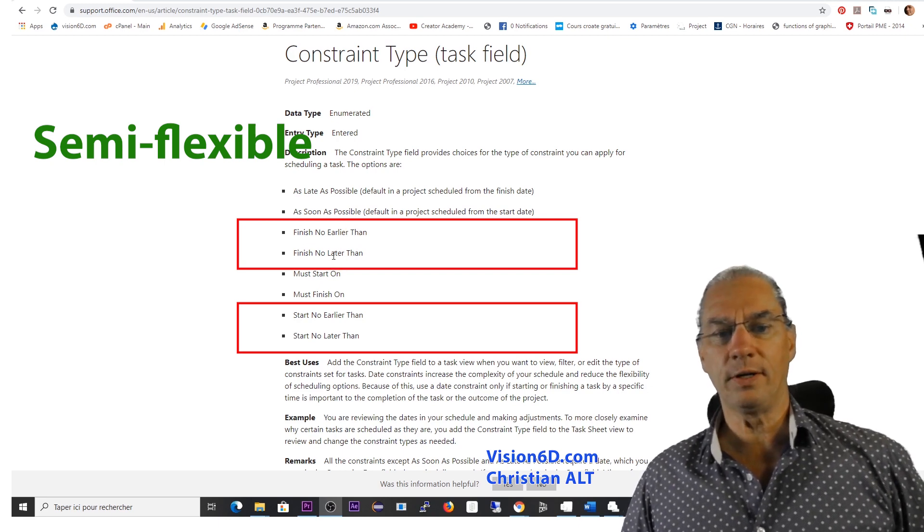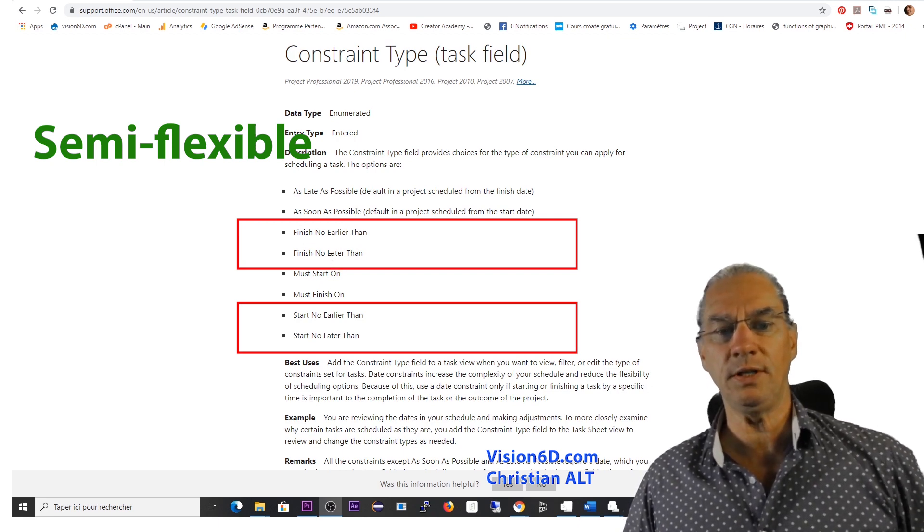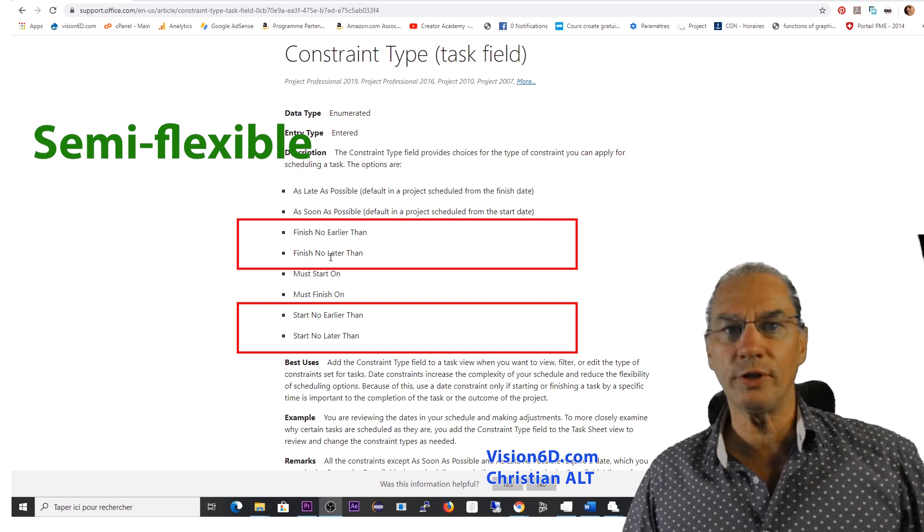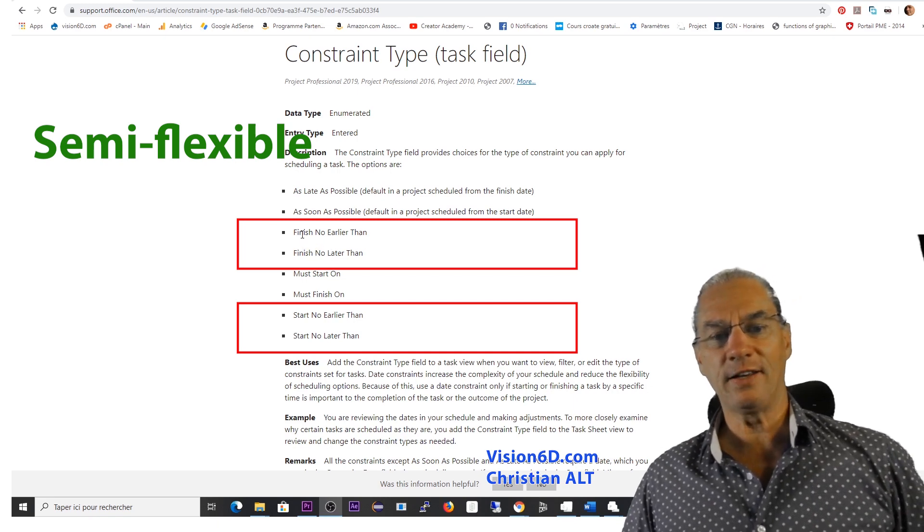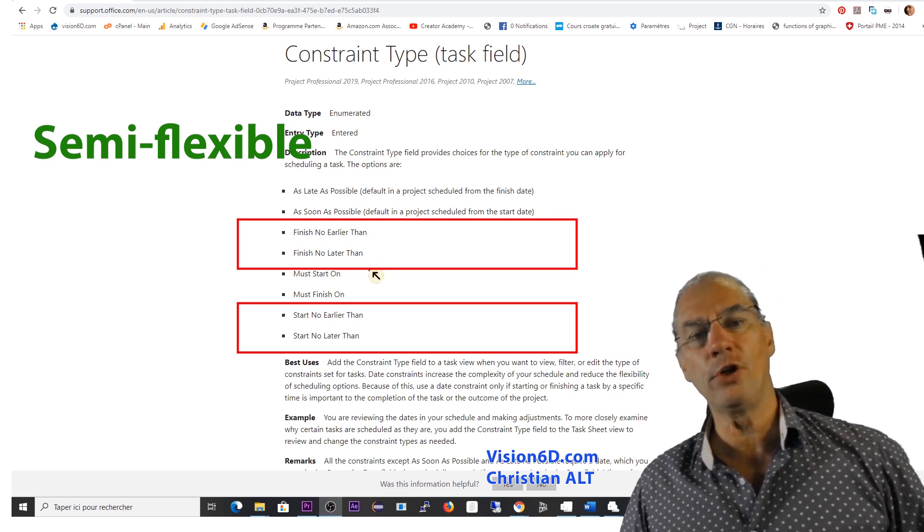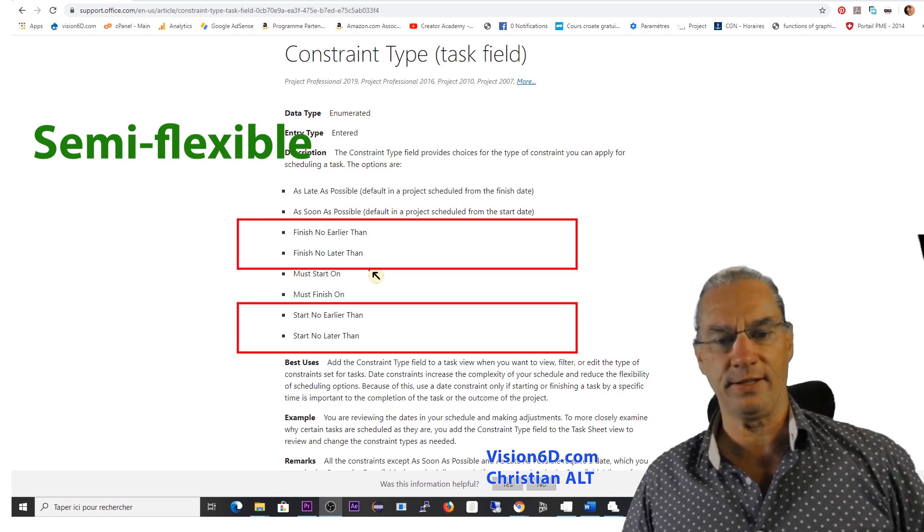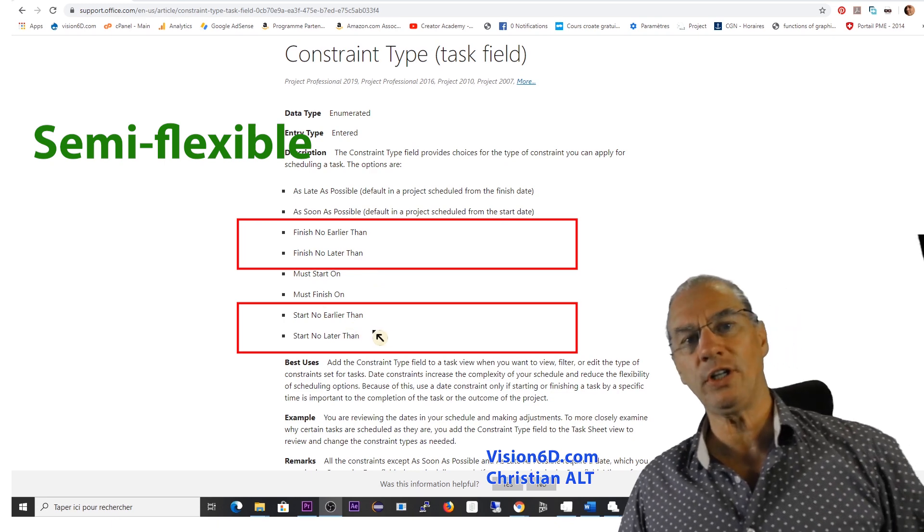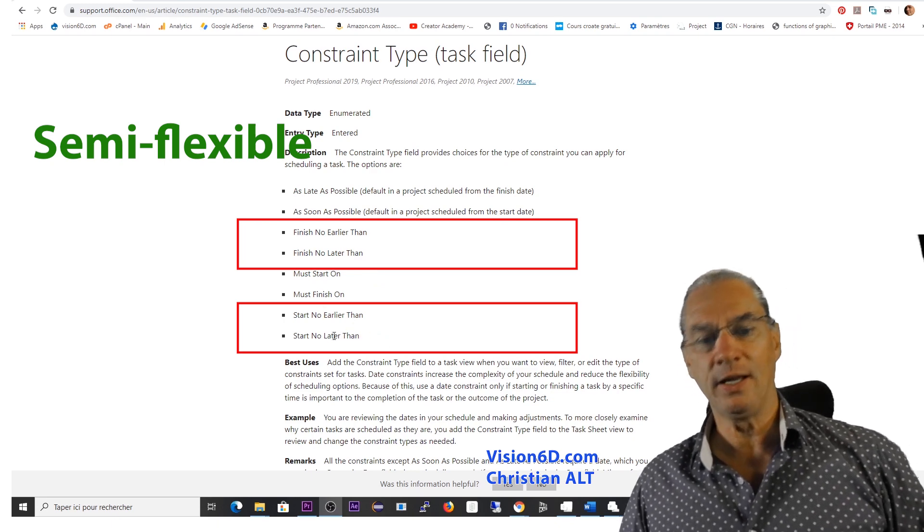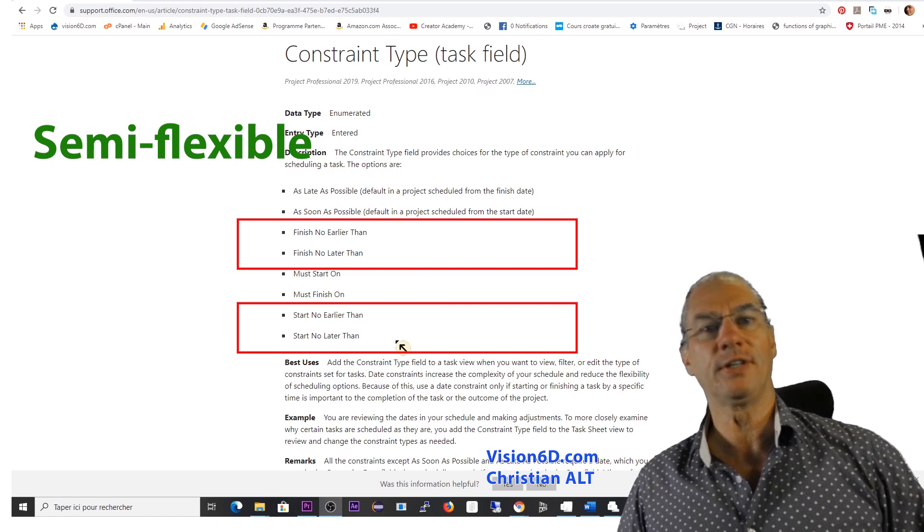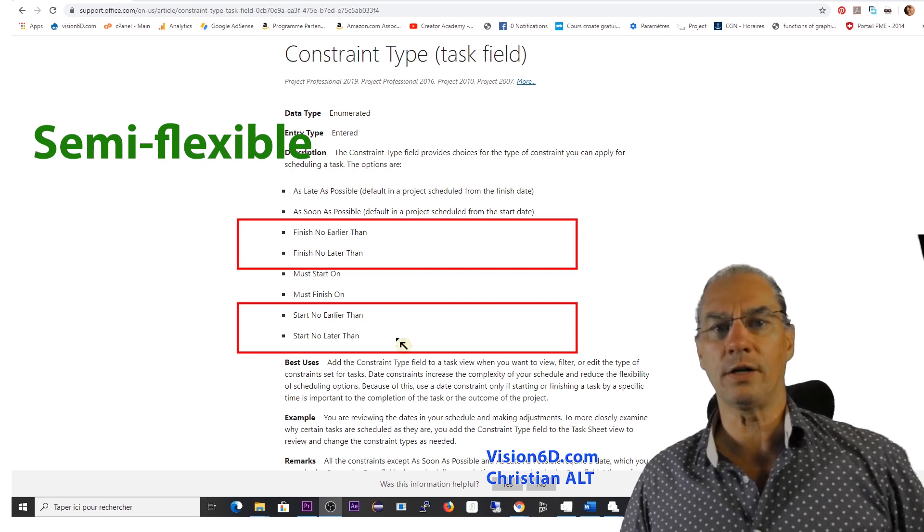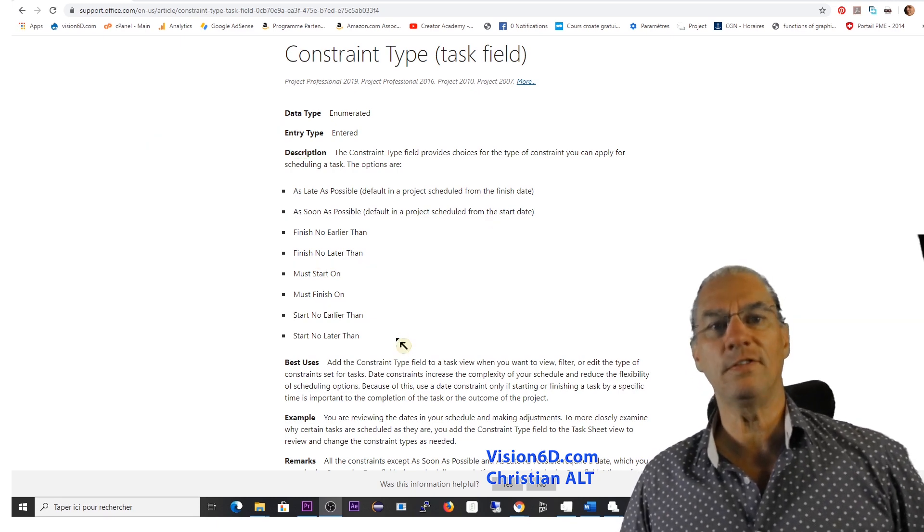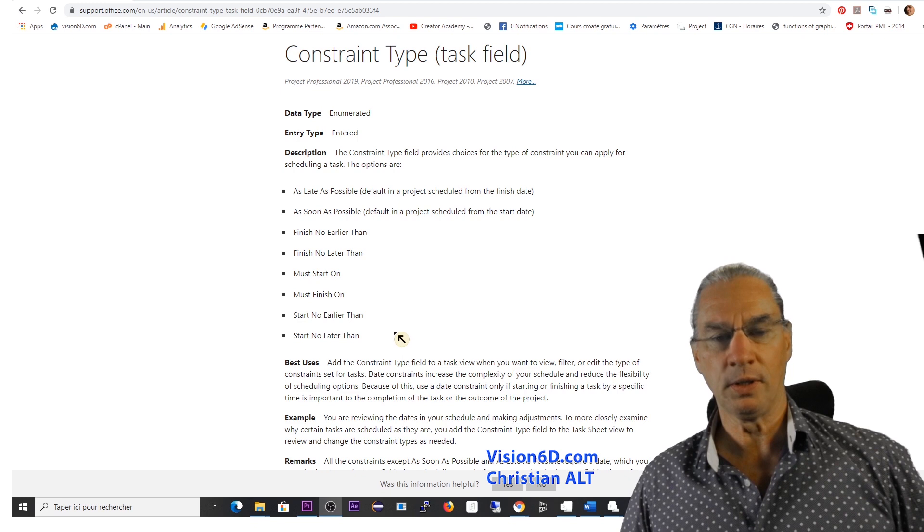And in between, you have middle flexibility, intermediary flexibility, like finish no earlier than, finish no later than and start no earlier than and start no later than. Those are the semi-flexible ones.